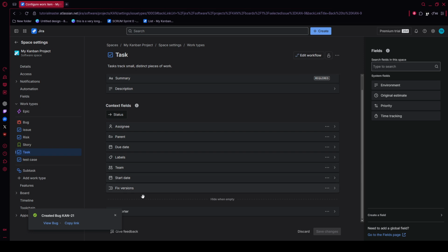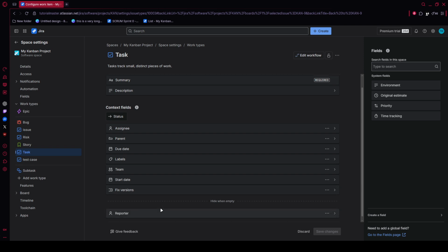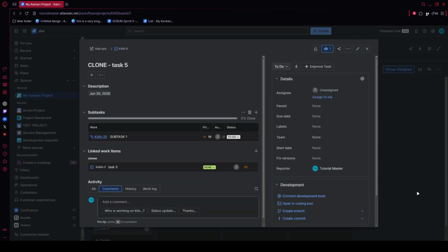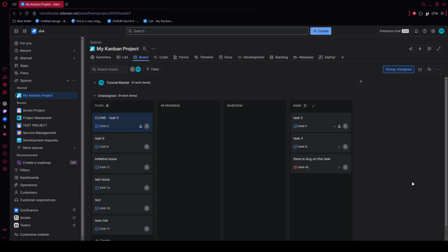If you want a more analytical sprint level view, go back to the left sidebar and click Reports. From there, choose Burn Down Chart. This report compares your team's actual progress against the ideal sprint pace. It's one of the best ways to spot whether work is tracking normally or whether scope changes and delays are